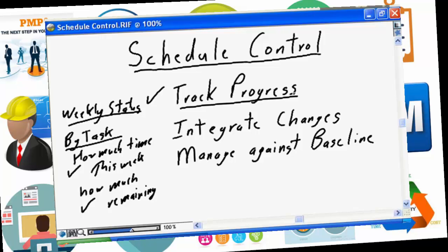It's your job as a team member to stand up to those moans. It's your job to ensure that you're getting the information that you need to track the progress for the project. You need to tell the team members they have to provide this information to you. They need to provide how much time they spend on each task, and they need to provide their best estimate for the remaining work to be done by task.